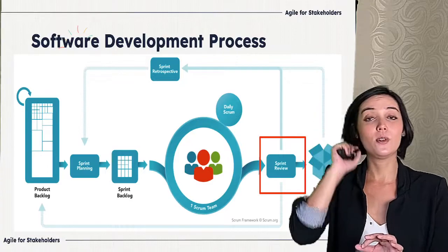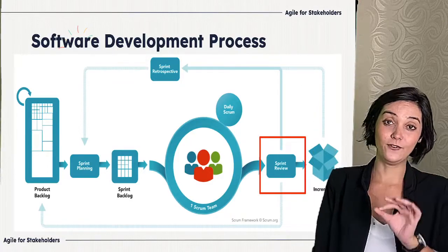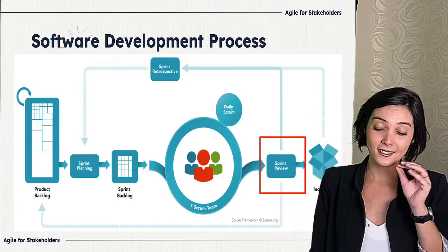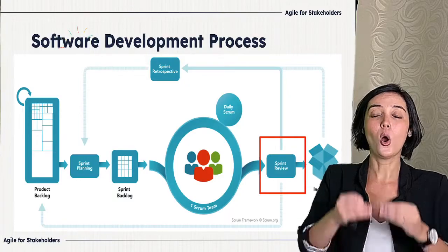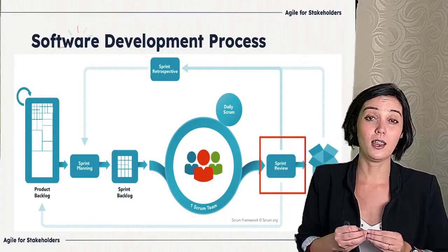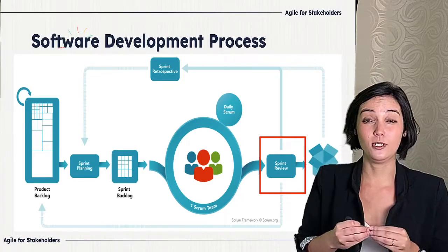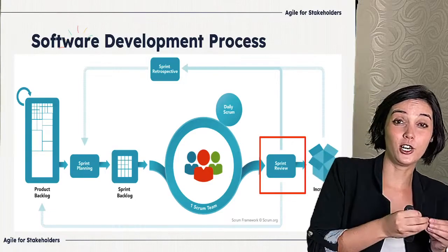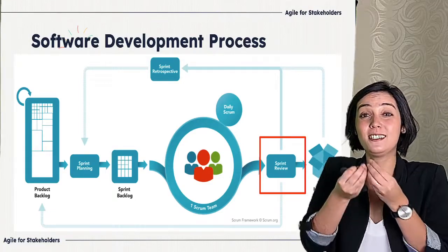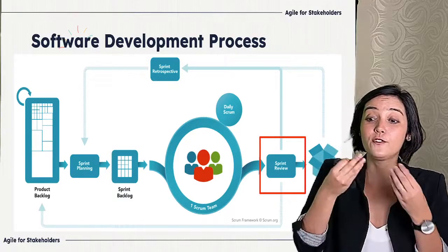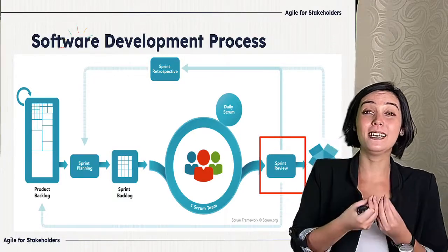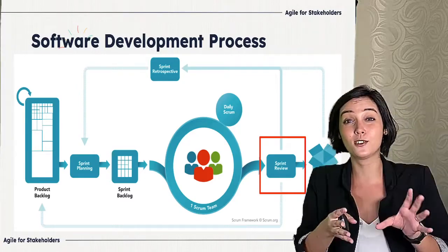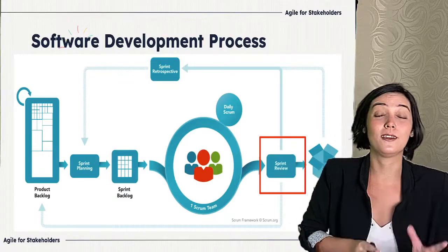The sprint review is an important event in Scrum, because it is when all the stakeholders participate, okay, and they are committed to this meeting, because they will show the Agile team, the Scrum team, if this increment is really useful, if the product backlog is still making sense, or if we need to change anything on the product backlog, or change direction.